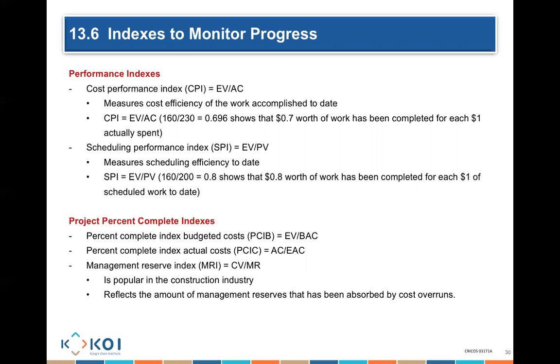We have management reserves, which is the extra money that management might give me in case things go wrong. So we have a management reserve index to show me how much of the management reserve I have actually spent by going over budget in terms of my costing.